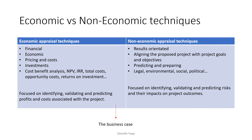All of these will link into what we call the business case, which brings it all together. This is the conclusion of your appraisal report and may also be called the recommendation — it is a complete statement documenting the rationale behind and justification for the project. It brings all of the evidence from the appraisal together, which the client will then use as the basis for their decision. It's really important that your appraisal report provides a complete picture of all arguments, both for and against the project.